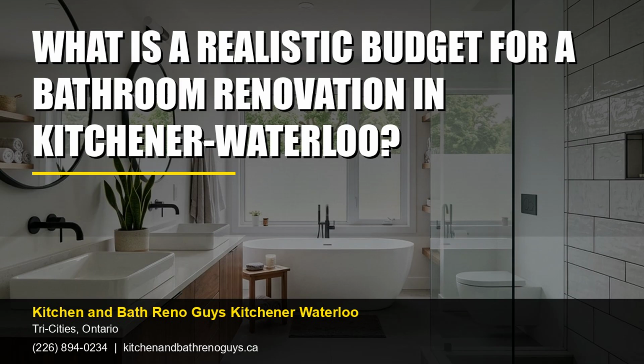Focus on essential upgrades that offer the best return on investment, such as energy-efficient fixtures. Consult with a bathroom renovation contractor in Kitchener to gain insights into local material and labor costs. Consider the timing of your renovation, as costs can fluctuate with demand during different seasons. Research and plan for permits, which may be necessary for certain structural changes to avoid delays and additional costs.